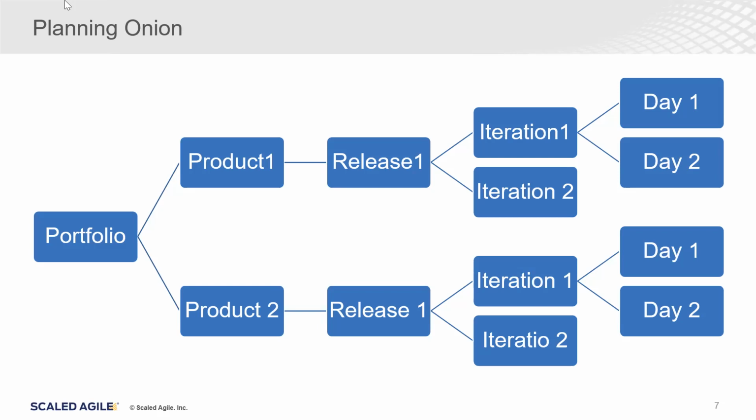Okay, you have the dependencies. Okay, I have these dependencies. My team has to work, which means I want this dependency to be completed. When can you complete it? Okay, you are giving this timeline. Once you complete, let me know, and my team will start working on this. So these POs, our business analysts, will interact with this product management team to get these dependencies aligned with our requirements. This is called PO syncs.